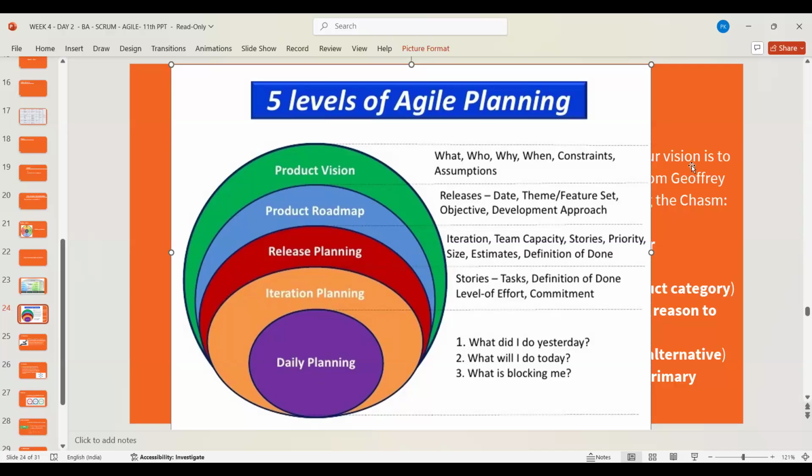It's a daily plan. So what are we starting with? As everybody knows, that is what happens in daily planning. Yesterday, Gaurav had been revising that in detail. Daily planning can also be utilized for stand-up meetings, because you share your daily updates in stand-up meetings, and you give three details. Geeta, can you read it out, please? What did I do yesterday? What will I do today? And what is blocking me?